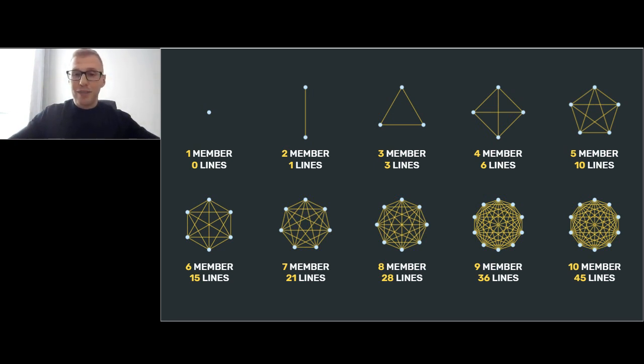But the main takeaway is that the bigger the team you have, the more complicated the communication and collaboration of that team will be. As I said, communication complexity grows quadratically with the team size, but the consequences of broken communication, I would say, grow exponentially. In designing PV farm layouts, as well as developing software products, broken communication is one of the biggest threats to the project. So we discussed the team size, the communication complexity, and how it grows with the team size and the project capacity.